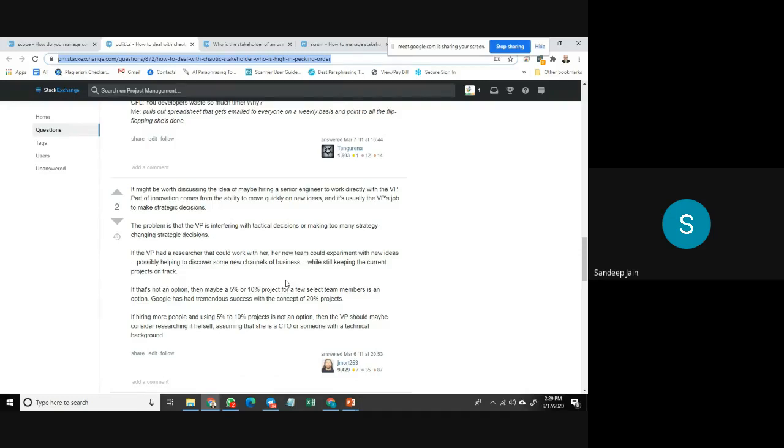When illogical demands are made on the project, one thing would be to call for a meeting without declaring this as an agenda, where people at a level similar to the VP are also part of the meeting, and then bring up that issue, and let people at that level take a call so that the fight is between equals.